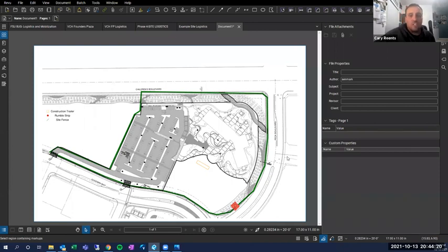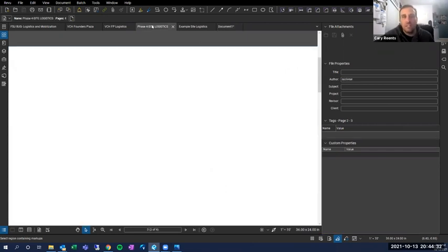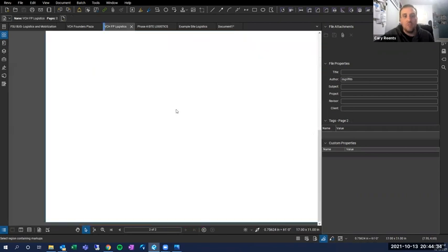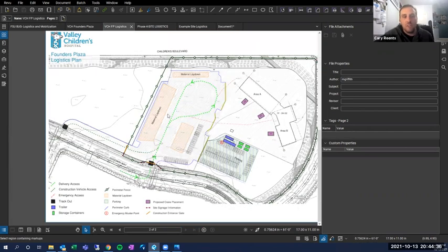Logistics on a job site changes constantly. So where you might show a parking lot, at some point you have to pave that parking lot that Sam's showing right here, which he has on his regional plan as their laydown yard. So at some point, all of that stuff has to move. It has to go somewhere. You see right there, that's that parking lot at the end of the job. So you have to figure out a time when you have to move all of that.